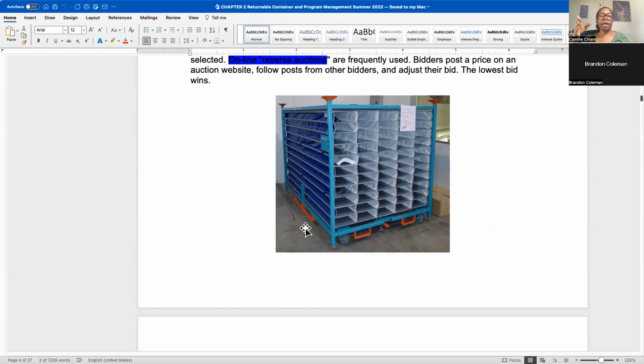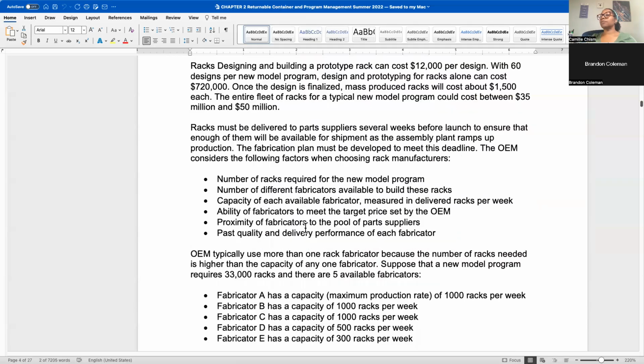So you want to look at that and back out from the production date. When do I need to have packaging there? If I know it's going to take me 30 weeks to get a certain package, and we're going to start on January 1, I need to go back 30 weeks from January 1 to start getting this packaging kicked off, approved, and made. So just keep those things in mind.